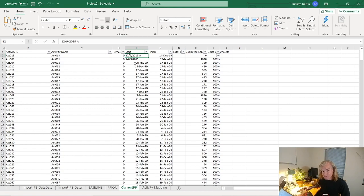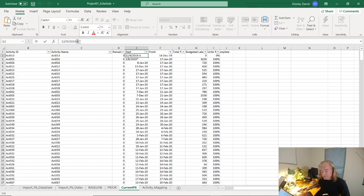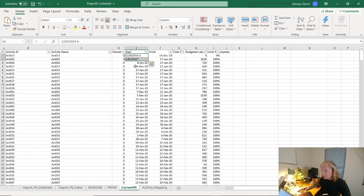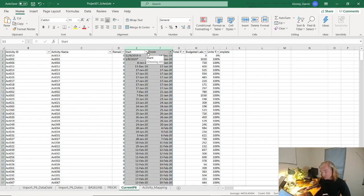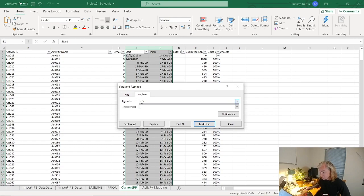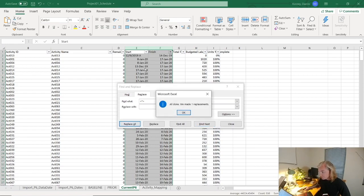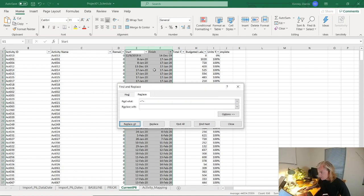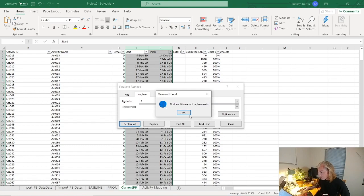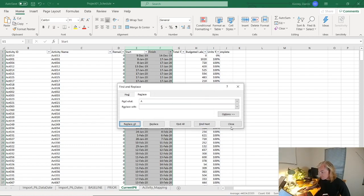A couple notes on formats when you import this. I'm not doing any transformations in Power BI, none that are really significant. When you get information out of P6 that says dash, obviously if you use an XER you don't need to worry about it, but I'm just doing copy and paste directly out of the activities view and you will get information that looks like that, which doesn't work very good. So a little hack: just do a replace. This will replace all your asterisks - little tilde asterisk tilde, replace all, there you go. Nice thing is Excel knows that's a date.